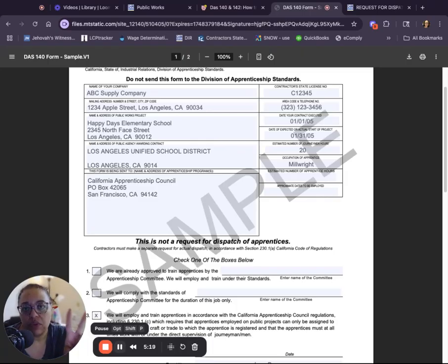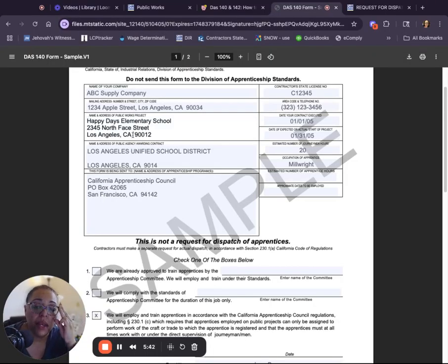The reason we need those things, and their start date, is because that allows us to fill out this form. So we already know who our client is. If we are contracted with a general contractor, we already know their address, we know their contractor state license number, we know their phone number, we know the name and address of the project because it has a DIR number, meaning it has a project number on the Department of Industrial Relations, that California website.